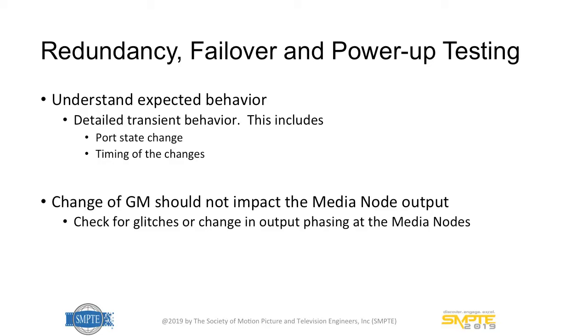Another important part of the testing is looking at your redundancy, failover, and power-up testing. It's very important in your system that if one grandmaster fails, it'll fail over properly. But you actually want to test that to make sure it's going to work. With that, you need to understand the detailed behaviors: how the ports are going to transition, and what the timing of that is. It's important to understand that at a pretty detailed level.